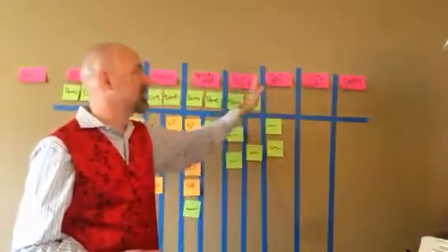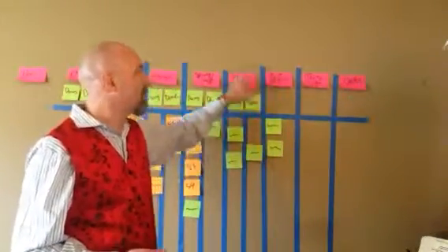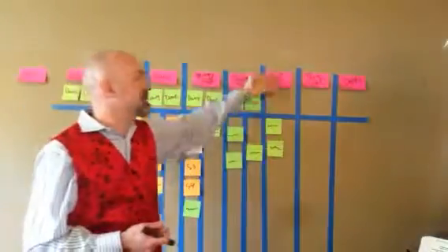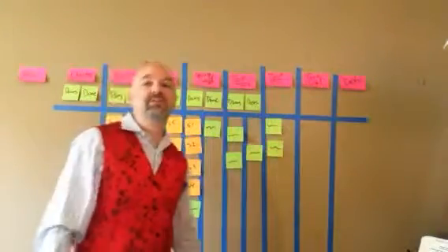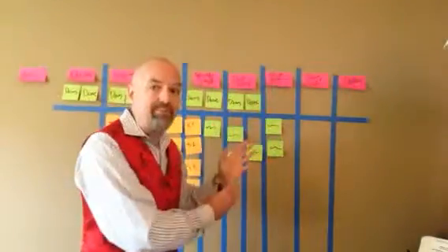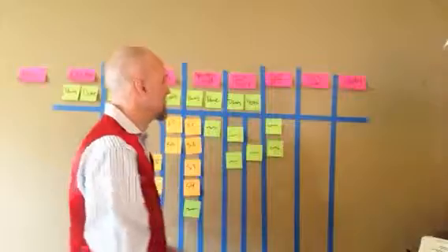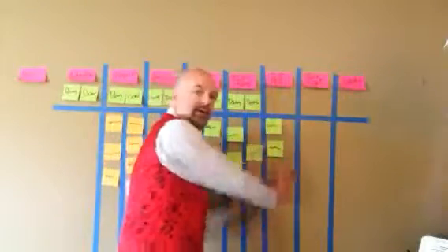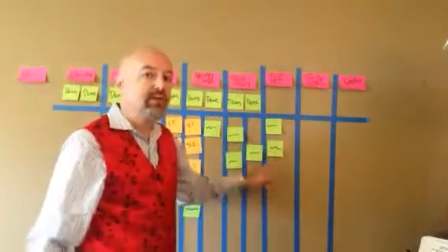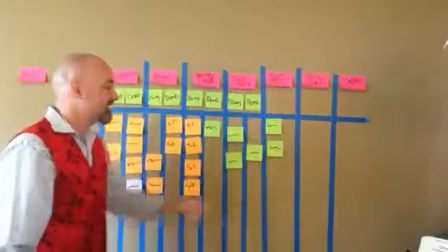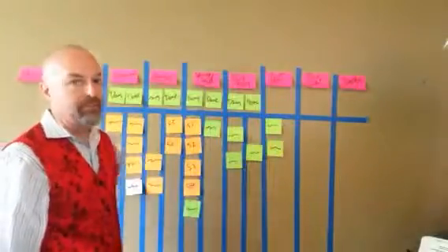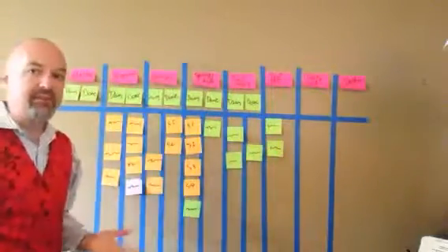You're still having to coordinate with other projects in these environments, right? There may be a waterfall project that has blocked up the PPD environment, and they're going to have it for 6 months because they have to have the whole darn thing. That's not a problem for you. Now you can show it, because suddenly all this work is going to start to pile up right here in this test done column, not getting into this column where it's ready to go and get produced. It's just going to sit here waiting, and you won't be able to move it forward. So that's the idea. It's not really complicated.